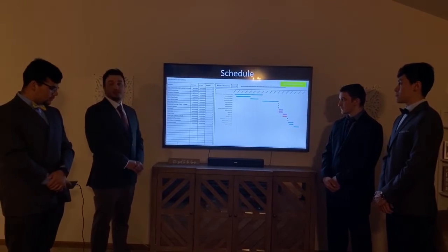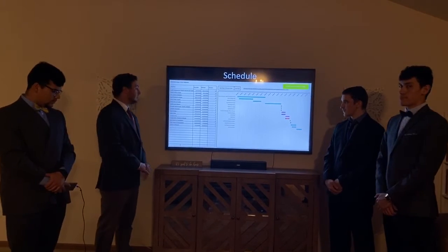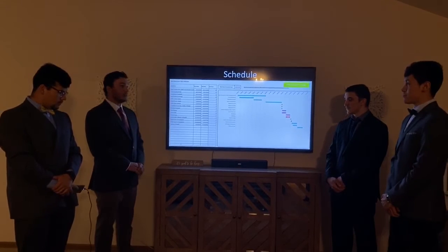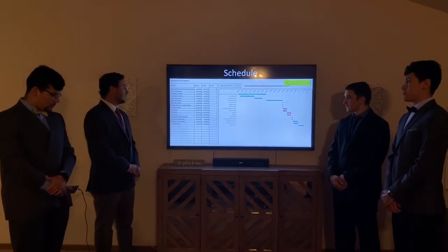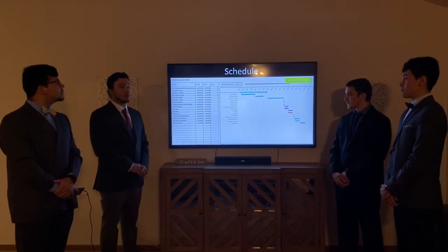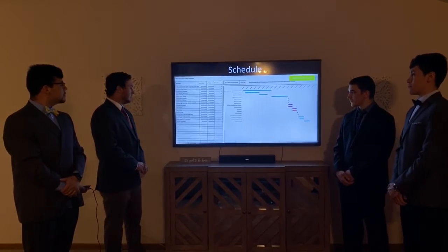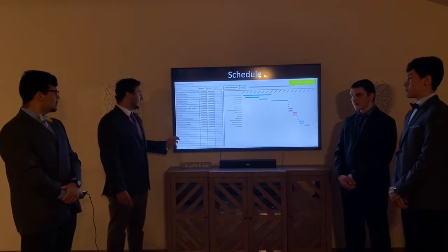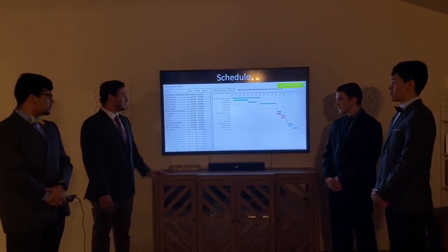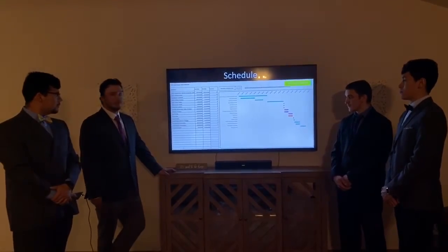By November the 17th, we'll begin testing and data collecting, and then we should finalize our data collection results by November 26th. And by doing so, we will practice and finish our report and presentation by December the 7th.